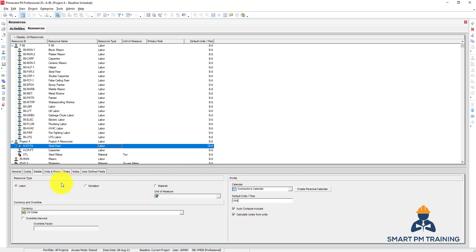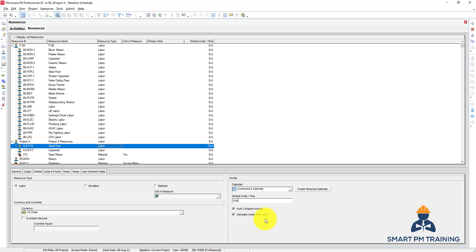And also you always keep them open here. So auto-compute actuals, calculate costs from units - so you do not have to interfere, update anything manually. Everything will be updated automatically when we deal with the earned value, when we give percentages to activities. So everything will be auto-computed, so you do not manually update anything. So always leave these two options open.